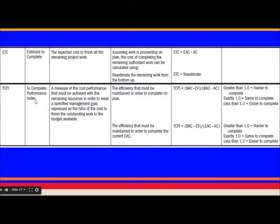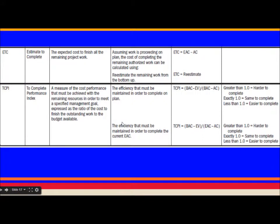To Complete Performance Index (TCPI) can be calculated using two formulas. If TCPI > 1, it is harder to complete the project; if TCPI < 1, it is easier to complete. TCPI is very important towards the end of a project to know the efficiency required to finish.